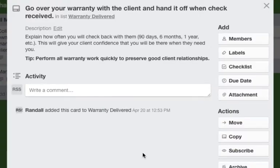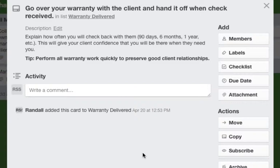Explain how often you will check back with them. Some of you check back in 90 days, 6 months and a year. Those are good check points. It gives your client a lot of confidence that you are still around. It reminds them that you are ready to take on new projects. And each time you go back to visit them and check their job out, ask them if they would refer you. This is a great way to get new jobs.